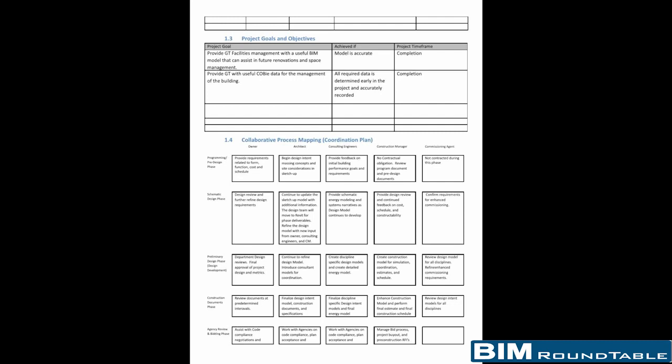You said you have a BIM execution plan for every phase that builds off of the last one. What happens if you have a conflict in the updated one that conflicts with something in the previous phase? Well, the way we say it is that this is a living document, so it's not a whole other plan; we just update that plan at every milestone in case something did change. But if it's all the same in DD, maybe that's why I didn't see a DD one, because they might have said this is still the plan. There's no changes for now.